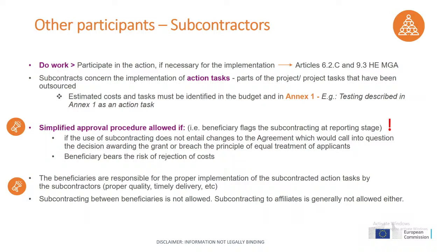So if you have not already selected your subcontractor, but you know already at the time of the grant agreement preparation that you will have to subcontract some action tasks, you need to identify in the grant agreement the tasks and the budget foreseen for the subcontracting.